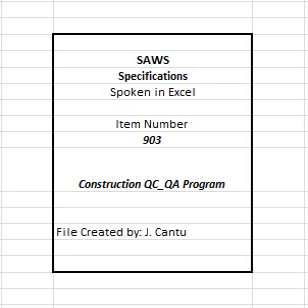4. Review and approve contractors' red line drawings. 5. Submittal of approved operation and maintenance manuals. 6. Completion of operation and maintenance training. 7. Submittal of specified spare parts. 8. Submittal of contractor warranty information.